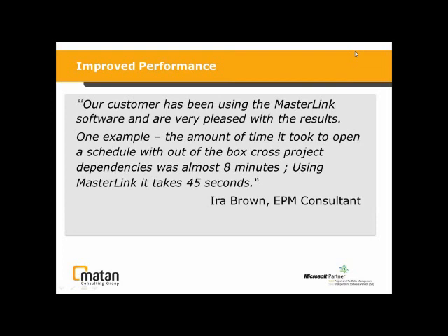Okay, great. The next one is a similar question, Daniel. When there are many linkages between subprojects in a master project, when should I think about consolidating them into a single project? Similar question. Again, it really goes back to who's responsible for things. So I wouldn't want to consolidate everything into one big project file if I have different owners within that project.